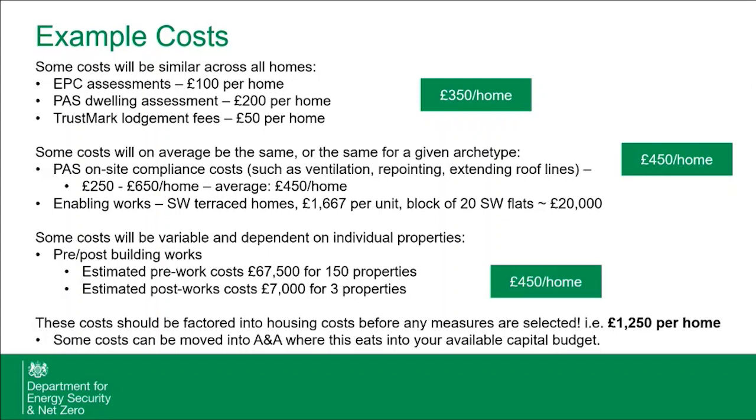Josephine, just so that we can make sure we're all on the same page, you can log enabling works as capital spend. I know that I'm going to sound like a broken record here, but capitalization is entirely up to you, and I think it will come with practice deciding how you want to do this. So if you would like to log enabling works as CapEx, you can do that. If you find that you're running out of your CapEx and it's impinging the measures you can install, you can obviously go back and change that and turn that into A&A. It's just important for it to be consistent.